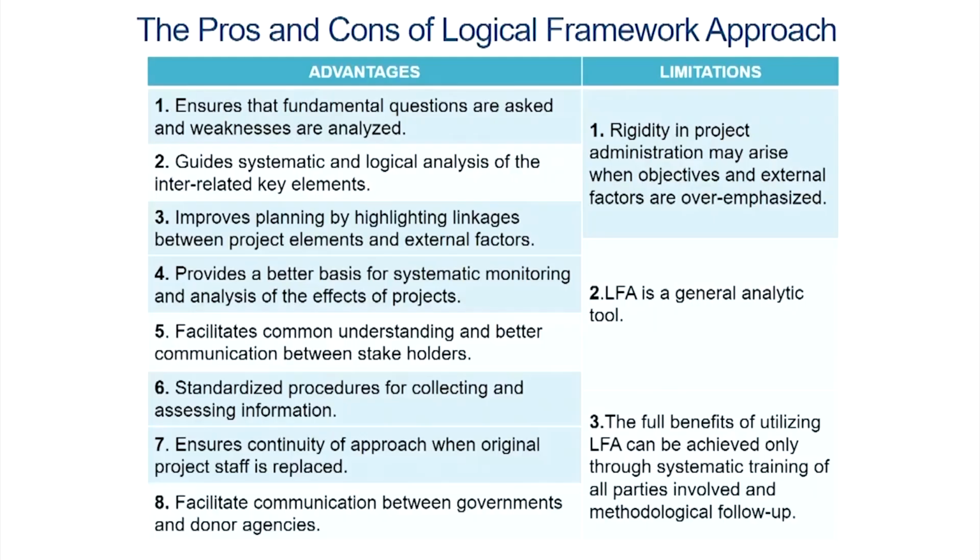However, there are certain limitations of this approach as well. One is, of course, that there is rigidity in project administration that may arise when objectives and external factors are overemphasized. When we emphasize the objectives of the exercise quite a lot in a very structured manner, that may lead to rigidity in the project, in the sense that there is not much scope to change things, that it becomes quite inflexible, and that is one of the limitations of this analysis.